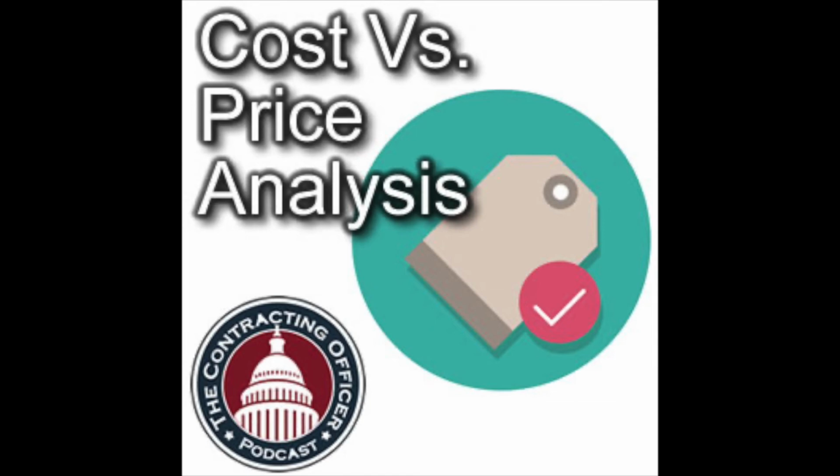And I want to jump on something you just said. If the contract was awarded competitively and now you're in the performance zone, you can use the facts that were competed to make decisions during the performance zone.